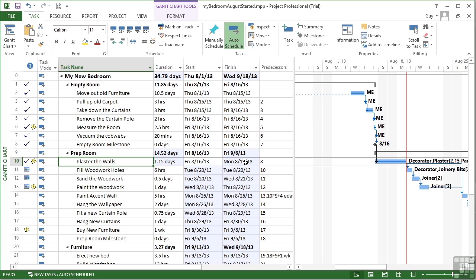So that's how to effectively control your project and use your project as a recording tool. We can see that we can push tasks forward by rescheduling, we can mark progression as we go, and we can even mark a task to be done faster than its original plan. What now remains to be seen is how we are looking compared to our original baseline that we saved. We saved it as a baseline so that we can measure ourselves against it at any point.